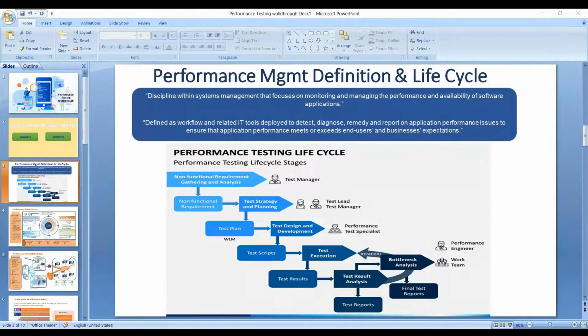As performance testing, we will deliver this, and as a customer, you will not be asking for more than that. But it usually happens that the customer, in the end, says, can you please do that. Let's say we have agreed on a load test, soak test, and endurance test. They will say, can you do one breakpoint test also? Or they can say, can you have two more rounds of this? They keep on increasing their demands in the end. At that time, we say that this is what we have agreed. Sometimes we do it as goodwill.